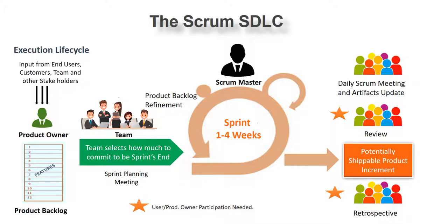And then after the sprint demo is done, we have another meeting called a sprint retrospective meeting. The point that I was driving earlier, which talked about doing a process improvement. Here, the product owner, the scrum master, and the development team all get together and discuss. Hey, you know what? Let's discuss what went wrong, what went right. How do we actually keep on doing the good stuff that we are doing? How do we address the challenges? And all of that gets discussed in the retrospective meeting.